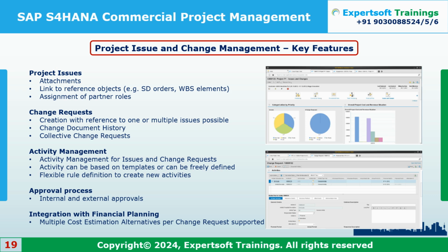Okay, can I estimate the cost as well? Like, this change in SOW will cost me 20 lakh rupees. So I can give that breakup also, right? You've registered it somewhere, written that because of this I'm getting some issue. You are assigning that to the financial manager. The financial manager will do any changes that you're going to integrate over here. And I am the risk manager of this risk register, and I say it has been approved. Then it has been resolved.